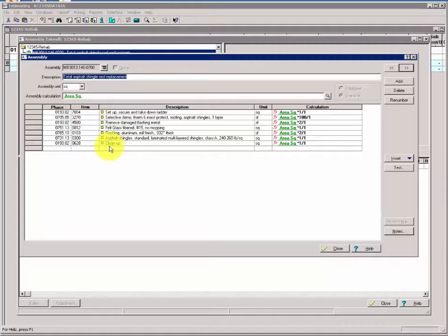Traditionally, assembly builders have ordered the items in their assemblies in the order you perform the work. So typically at the beginning of a roofing job you would secure access, a ladder or scaffolding, and at the end of the job you would clean it up, with all the various components going in between those two things. And we'll keep that same format. So our setup and takedown of the ladder is good. Removing the shingles themselves, we'll keep removing the flashing. But after that, before we put the waterproofing on the roof, we're going to go ahead and insert all the framing members between these two items.